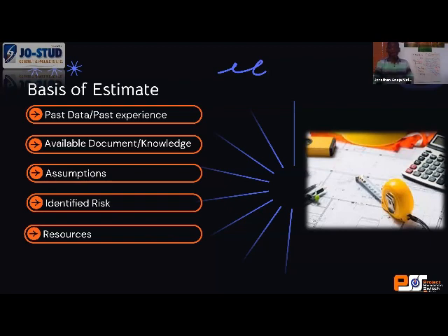For example, you ask yourself, do I have 3 masons on my list? Do I have 4? Do I have 2? You will consider it before you estimate. So if you only have access to 2 masons, you have to base all your estimate at the back of your mind that the resources I have is 2 masons. The same way, especially when you are doing a top-down, when a client has told you my pocket is small, it's good you always ask your client, how much do you have? So that you tell him, can he do it or can he not do it before you start the work. So you need to have at the back of your mind all your resources.